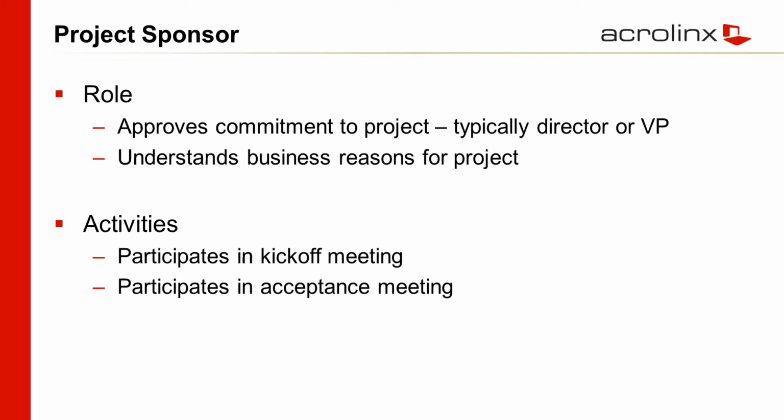So the sponsor of the project is typically an executive level or director level person in the organization. That's the person who approves the organization's commitment to the project, the one who approves or is critical to getting funding, the one you've had to convince why you're doing a project, what the business reasons are. This person should participate in the kickoff meeting.